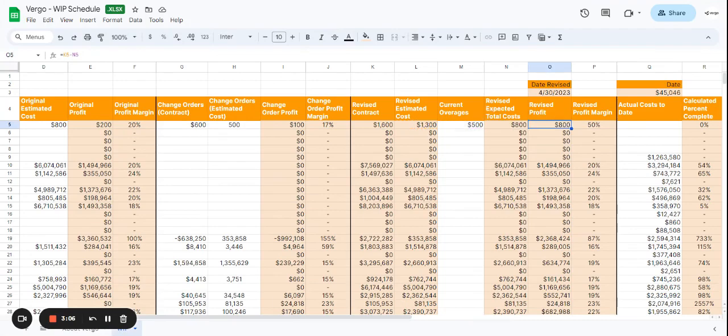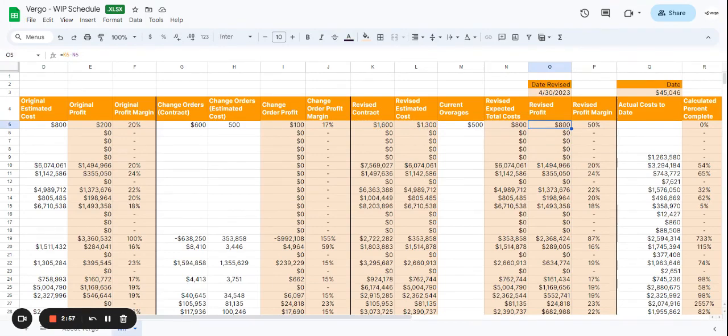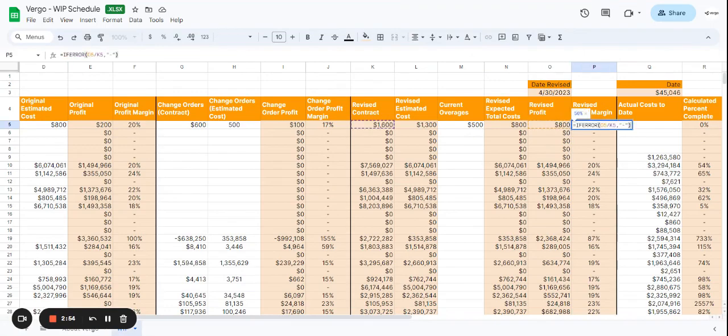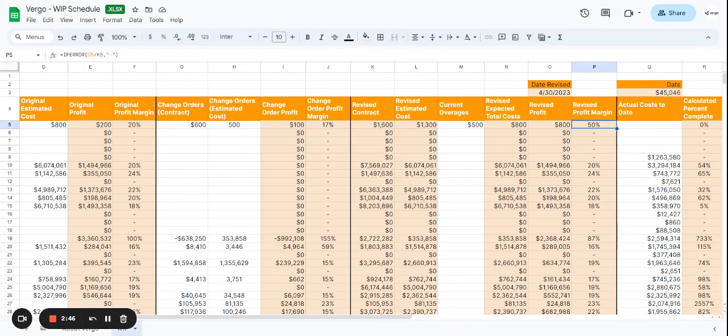Next we have a revised profit, which is going to calculate the revised profit minus the revised expected total cost, which gives us a total of $800 as well. Then we have a revised profit margin, which is going to calculate, again, the revised contract divided by the revised profit, which gives us a 50% revised profit margin.